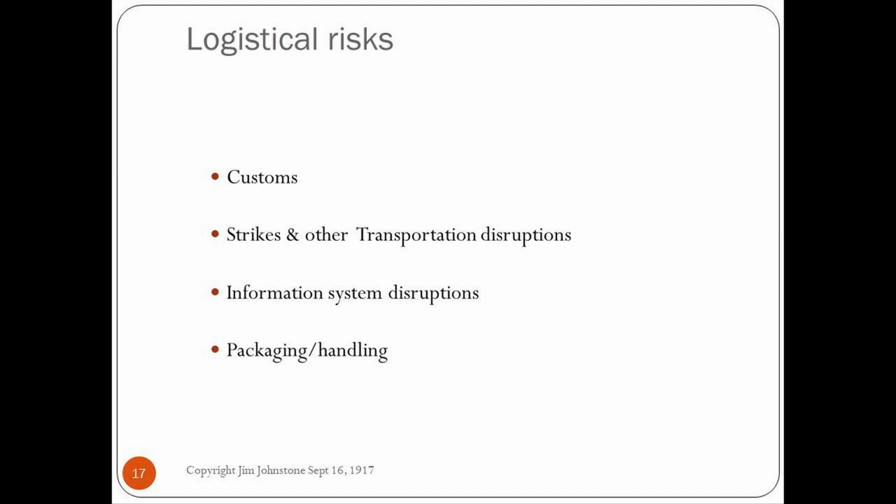Suppliers can use all kinds of modes of transportation. You've got land, sea, air. Land could be truck or rail, or fast runner in tennis shoes. Sea transportation generally is going to take you, if you're importing things to the U.S. from overseas, probably 30 to 40 days to get those products from your supplier to you.